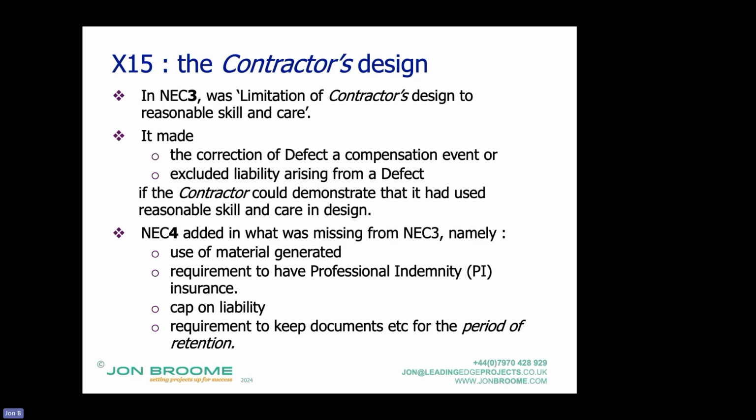With this, it reduces the level of liability down to the same level as the designers, so the contractor's not the piggy in the middle, if you like. Any contractor with any commercial acumen, I'm not even going, acumen is overstating it, will not contract without X15 in place if they've got any design on it.